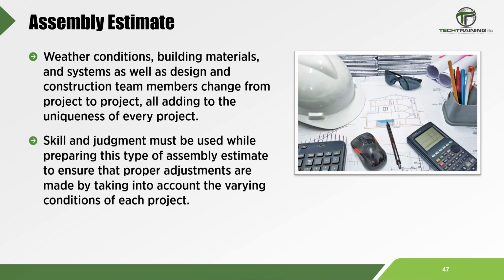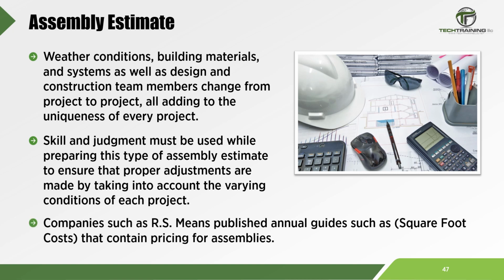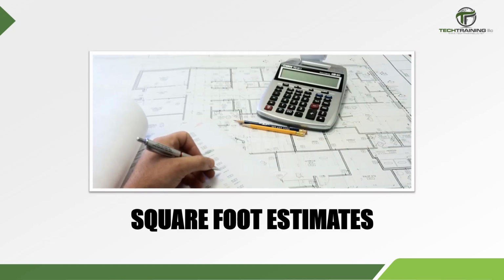Skill and judgment must be used while preparing this type of estimate to ensure that proper adjustments are made by taking into account the varying conditions of each project. Companies and organizations will publish annual guides such as square foot costs that contain pricing for specific assemblies. And speaking of square foot estimates, let's now move on to square foot estimating.